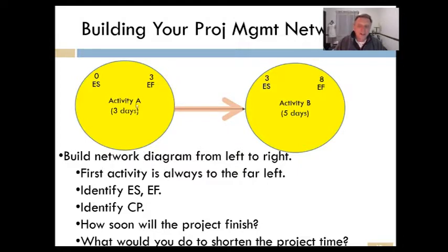Now, it could actually finish later if this activity is planned for 3, but it actually goes to 6 or 7 days. Early finish is out the door. Then you had kind of like a late finish date. But for now, we're just going to keep it simple. Early finish is really the result of adding the early start days to the activity days it's planned. It gives you early finish.